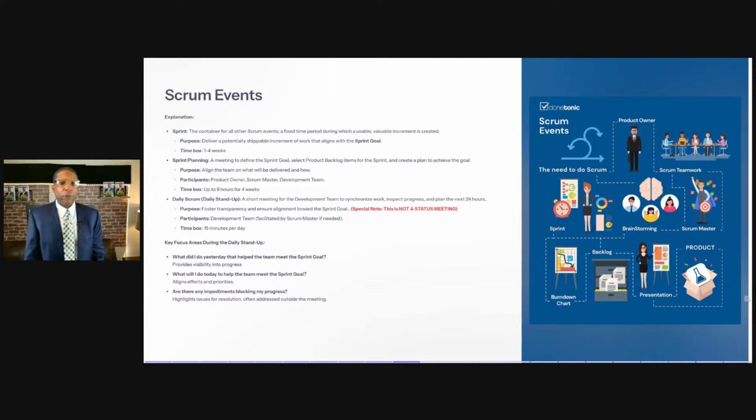This is a shout out to my mentor, Phil. Special note, this is something I had to learn as well, family. We have to understand that these daily stand-ups, or the daily Scrum, time-boxed to 15 minutes per day, are not meant to be a status meeting, compared to what you would normally have in a predictive or waterfall type project, where you go into a meeting and most of the time it's a status meeting. This is not that type of thing. This is just to ask those questions, which we'll mirror down in a minute. But again, not a status meeting. I want you to understand that, because that's miscommunication out there in the world. I've seen that. I've been a victim of it because I thought, yeah, it is a status meeting, but it is not really a status meeting.